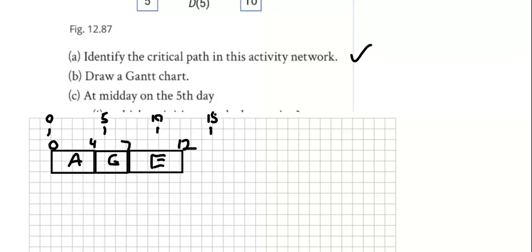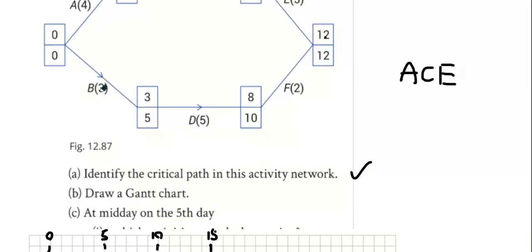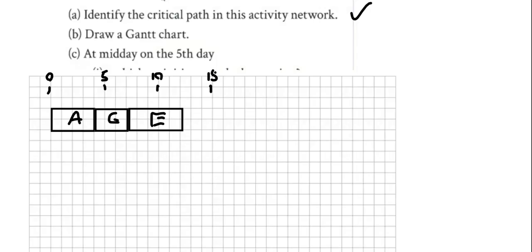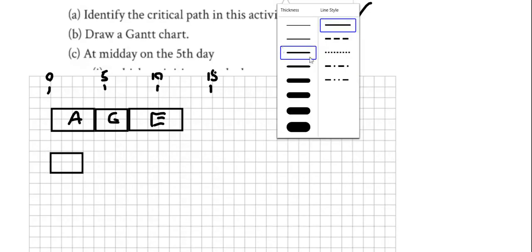All right. Now, the problem is, what ones are we not taking into consideration? Which ones have I not done yet? Have I done B yet? No. Okay, so when does B start? B starts at 0, and it's done in 3 minutes. So here I'm going to do B now. Ready? So here's B. Now here's the problem with B. So B is 0 to 3, isn't it? But the problem is it's 3 to 5 minutes. So it could have taken an extra 2 minutes.